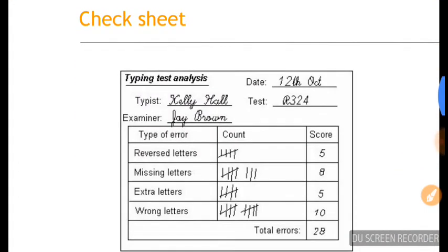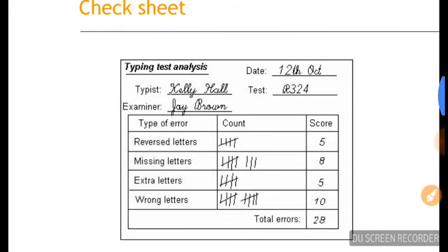Then the check sheet is another tool. At the time of planning, we have to decide what all check sheets we'll be using, and during execution time, we do it. So we used to have this contract review checklist, requirements review checklist, design review checklist, code review checklist, those kind of things.